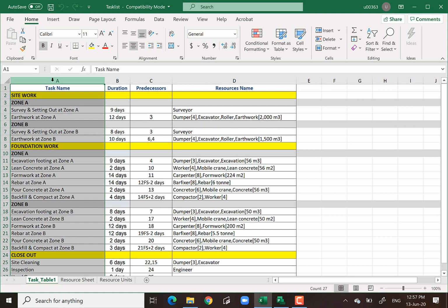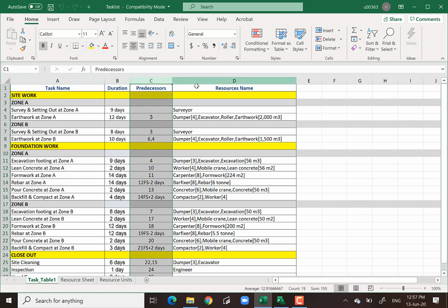into Microsoft Project. The good thing is that you can import your Excel data into Microsoft Project, because Microsoft Project spreadsheet column with Excel column, basically they are very similar. They can read those things, but when you import, you have to make sure that you are inputting using the same format that Microsoft Project wants.